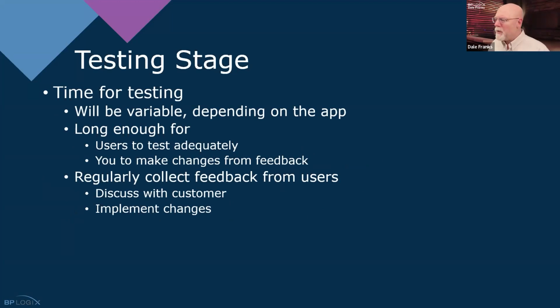Well, we've got to think about 2 things. A, the users have to have enough time to test it adequately. B, you've got to have enough time to make changes and roll them back out to the users so that they can see if your changes work. Collect feedback from the customers. So you're going to need time to have that feedback, and have the customer look at it. Maybe the initial customer, the person who commissioned the app, is going to want you to make some changes in addition to any changes that are directly requested from the users.